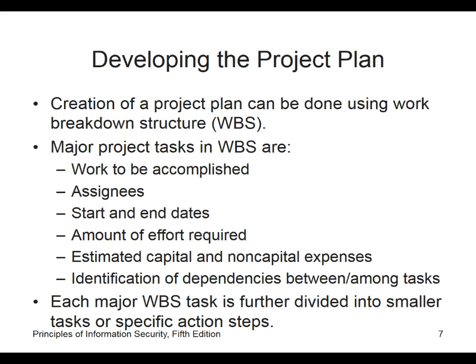Say we're going to work on this room. What are some of the things we need to do? Obviously, say we're painting it. So should we move the stuff off the walls? But is that something we want to list on the report? Like this small room here, do you think you'd list on your workflow diagram, your breakdown structure, remove the clock? Probably not, because it's a very minor task.